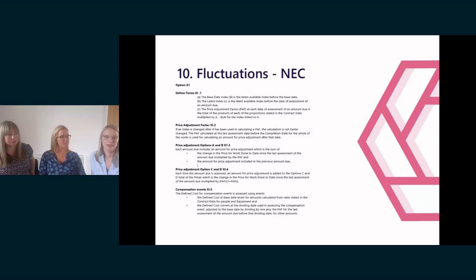So what can you do? If there's a bond requirement, agreeing the wording early with your surety is absolutely essential, and getting the correct wording in the contract that the surety has actually agreed to provide, which at the moment is usually the standard ABI wording and not much else. That has to be agreed at the outset. Another option, which we've dealt with here, is to hold the bond sum in escrow. So rather than take out a bond, get your solicitor to hold that sum of money, and then it's paid out.